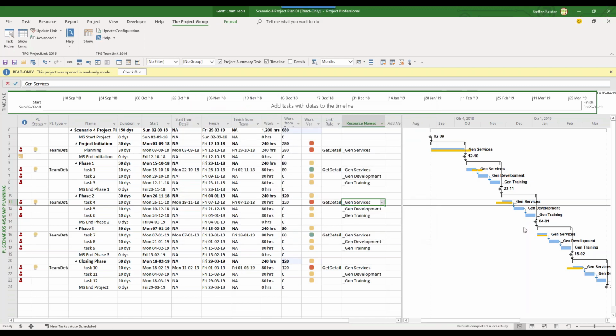So close that one. And exactly, you can see, okay, there is a red mark now. The team manager has planned 40 hours more, and I can see, okay, there is a date difference. Same here. This one is green. This one is green as well. And I can also see the differences between my planning, my expectations, and what the team has planned by itself.